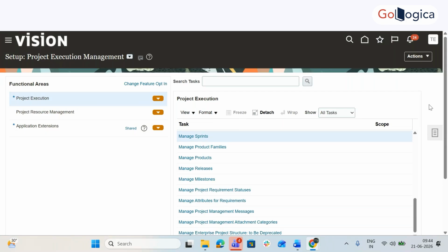Then what happens in the sprint? We are going to demonstrate. I told you that at least 2 iterations are needed. Two are never enough, actually, if you ask me. So your manager will tell you, okay, Kirti, today from 1st of July, our sprint 1 will start. Sprint 1 will start of which phase? Process playback phase. So every phase will have sprints. Process playback, you can ask your client, how many sprints are there? Sprints means how many times you are going to repeat that activity of demonstrating. He will tell you, we have signed 3 sprints with our client, and he will give you the timeline. So in July, from 1st of July to 31st of July, we have sprint 1.